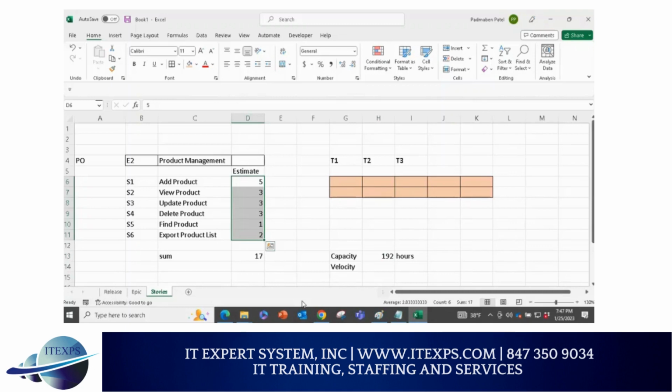But I know my team capacity, yes or no. But I don't know what work I can take. So I'm in a sprint planning meeting. 3 people are there, product owner is there. I don't know how much work I can take, yes or no. So Scrum Master says, wait a minute, we have 192 hours. Whatever you want, we can do in those hours. But don't expect more than that. So now product owner says, wait a minute, I have stories, you have hours, let's do it together and break it down from story to task. Make sense or no? Yeah.